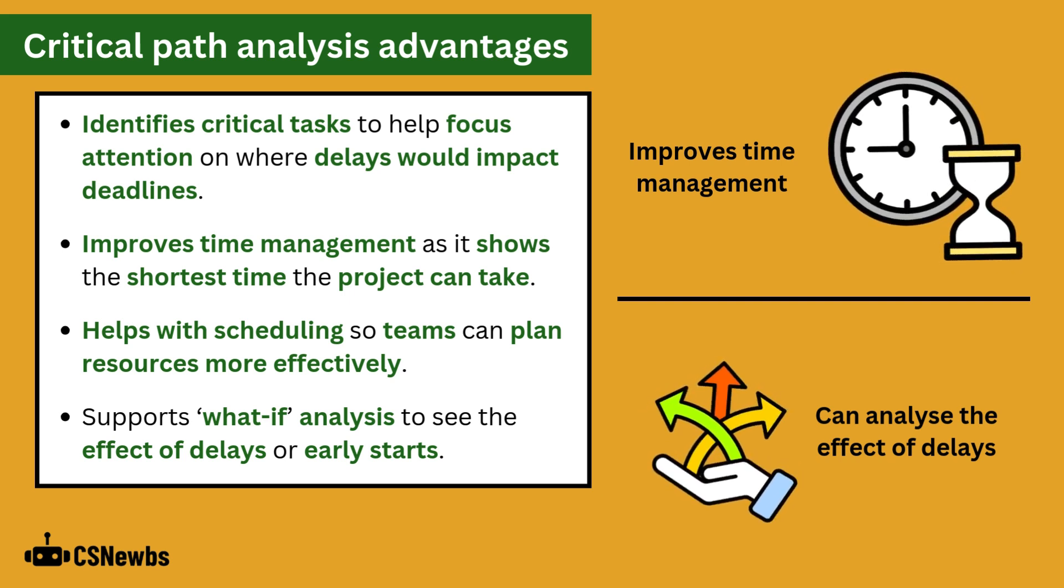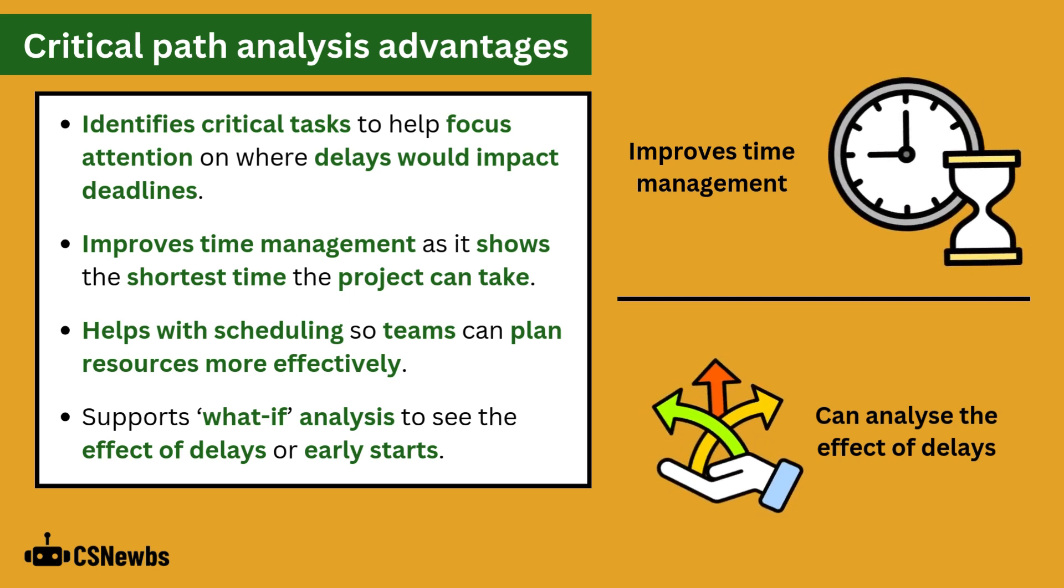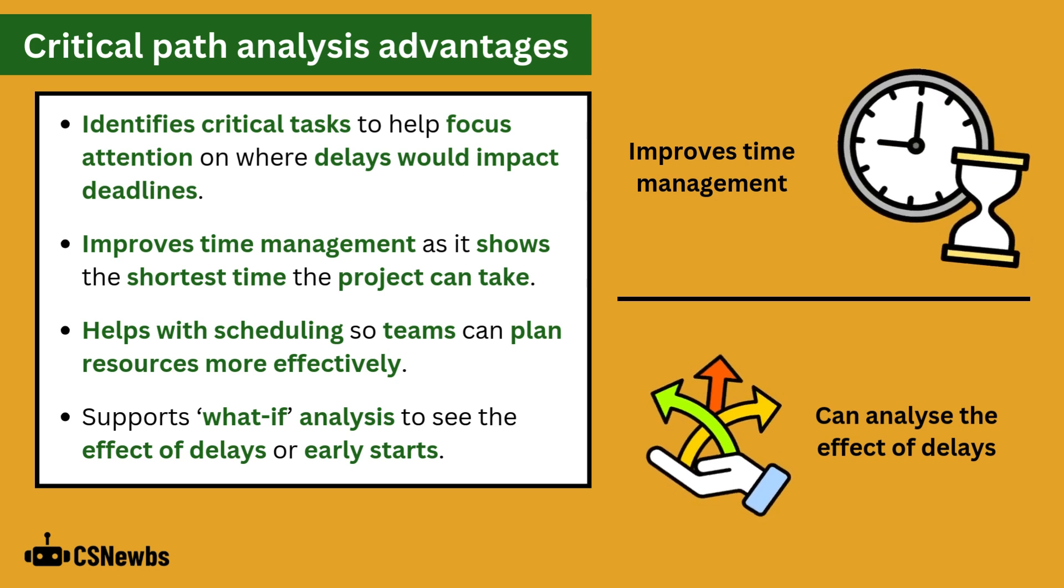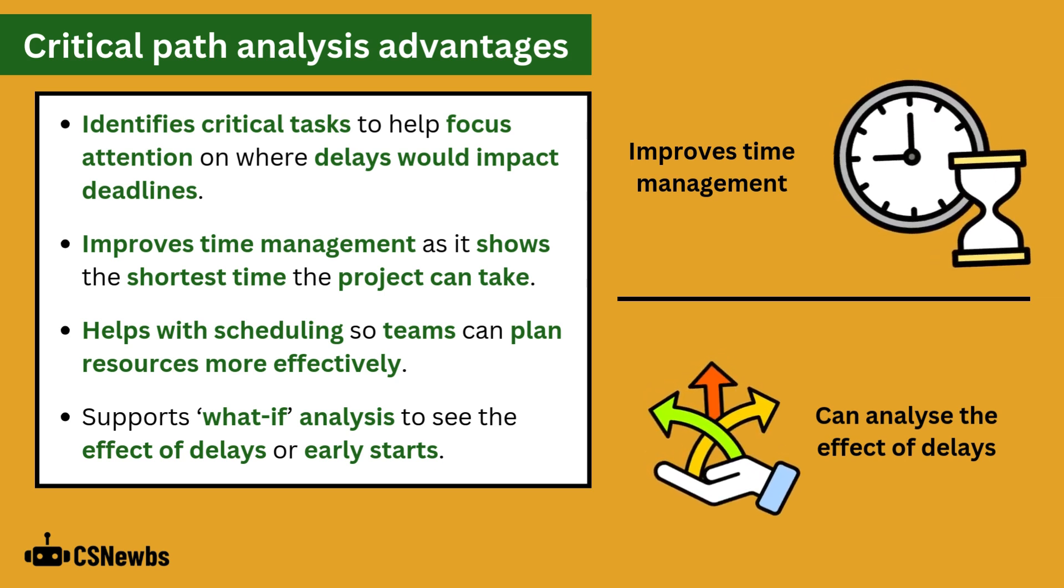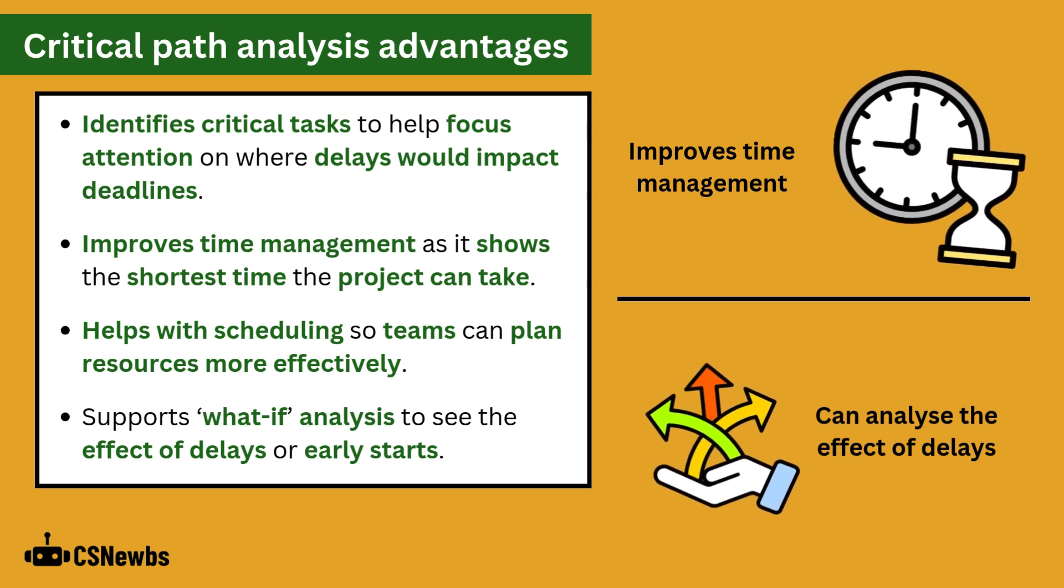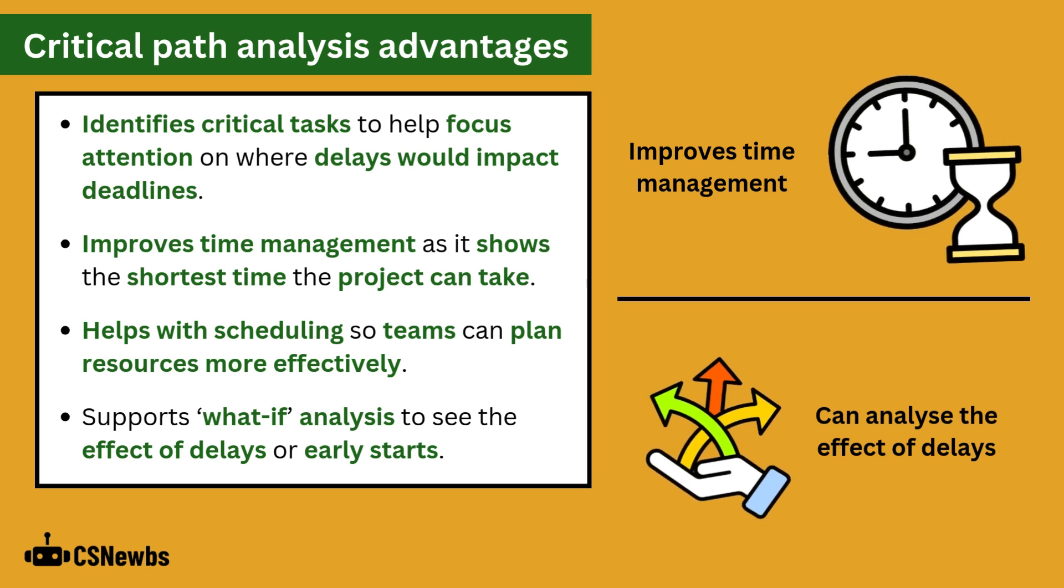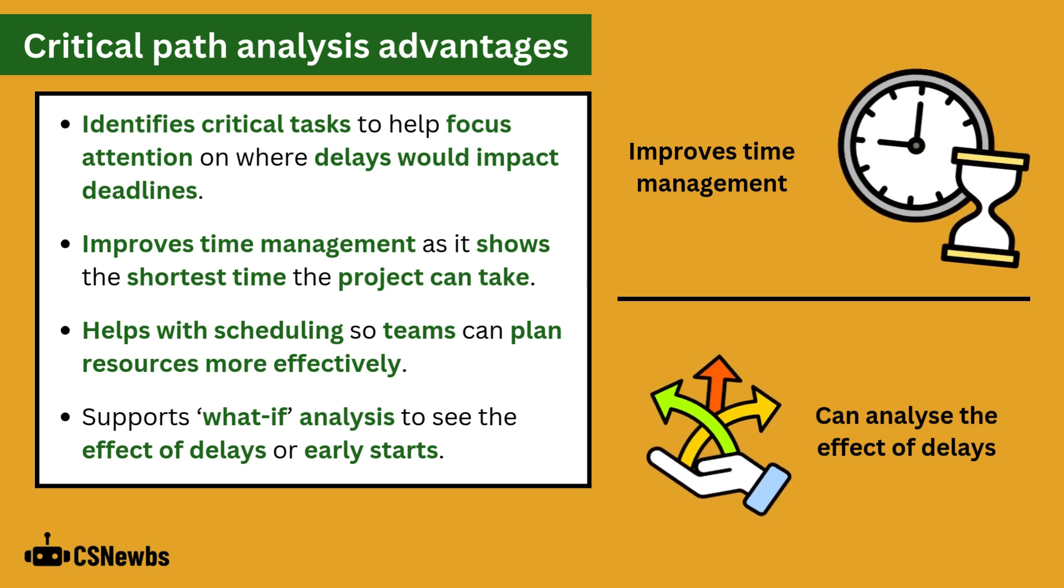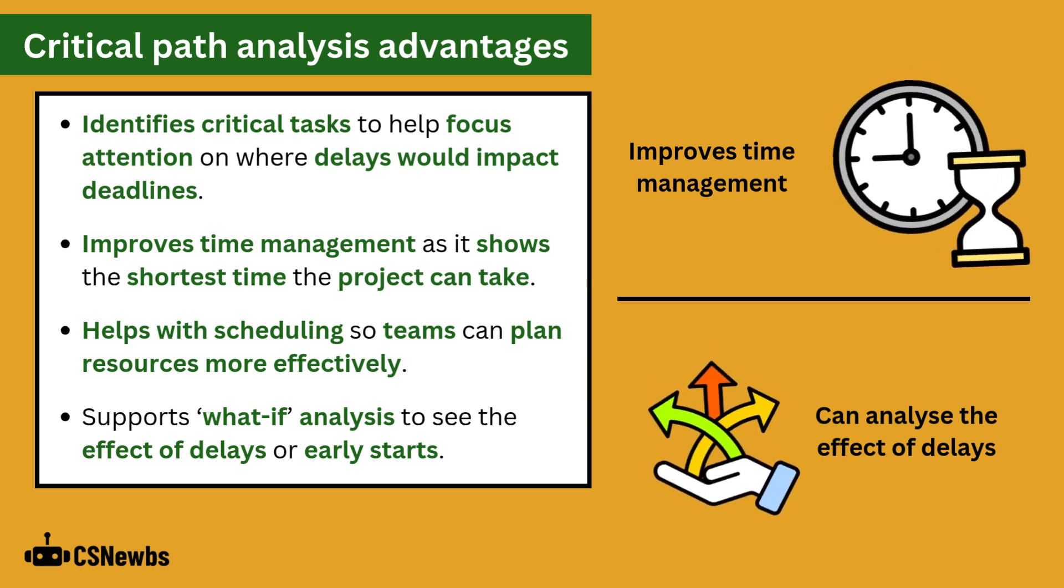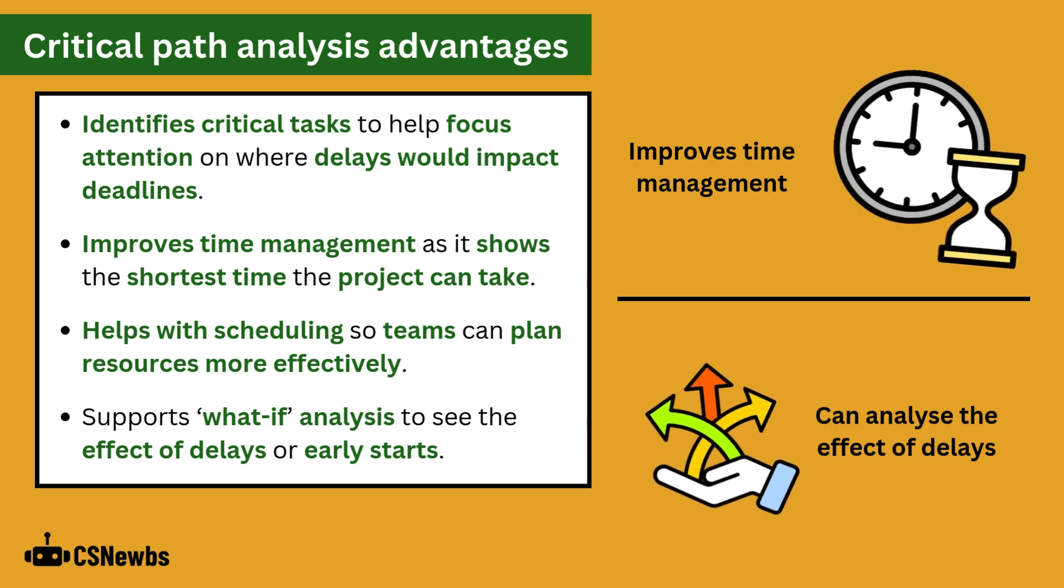Advantages of critical path analysis include that it identifies critical tasks to help focus attention on where delays would impact deadlines. It improves time management as it shows the shortest time the project can take. It helps with scheduling so teams can plan resources more effectively. And it supports what-if analysis to see the effect of delays or early starts.